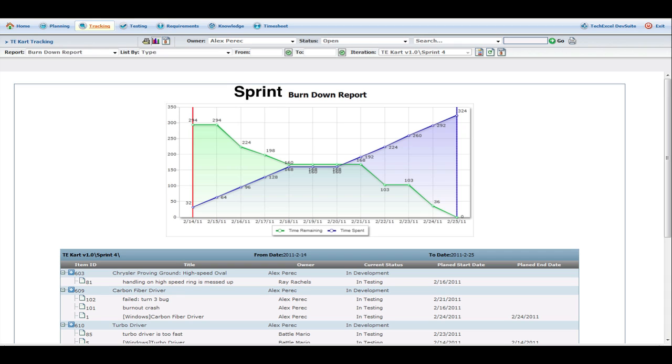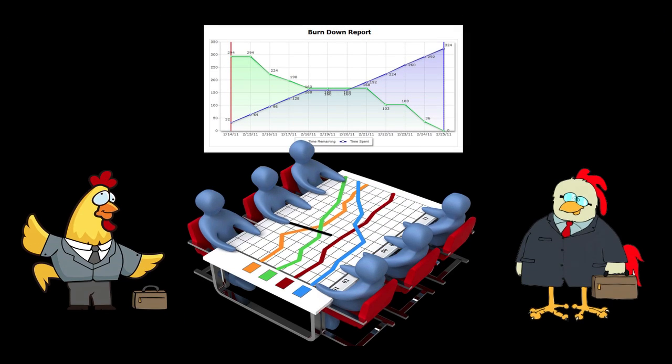With the sprint burndown, we start with our total task estimates, and as work is completed, we lower those estimates until they hit zero. This gives us our burndown line. Within a few days of the sprint starting, we can check the slope of our burndown line to gauge our velocity and estimate when all the tasks will be completed. The sprint burndown is generally used internally throughout the sprint and should be displayed somewhere prominent that all team members and stakeholders can see.